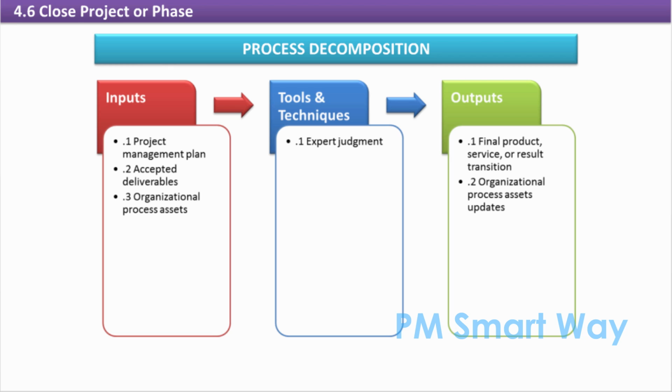This includes archiving project information and artifacts, documenting lessons learned, and providing final reports on project performance, including schedule, budget, and risks. Some activities may begin in this process even before the project as a whole is ready to enter the closing steps. Processes here are performed by the project manager, project management team, vendors, and the performing organization's management,